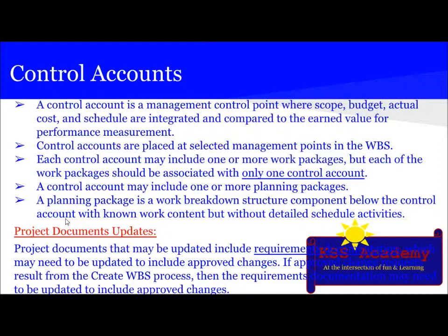And WBS is created by project teams and then serves as a team development tool. It is not time based, but it is deliverable oriented, and helps communication between the project team and stakeholders. WBS dictionary has detailed work, resource, cost, and quality information of WBS components. Then control account is the management point in WBS where scope, cost, and schedule are integrated and uses earned value management to evaluate performance.